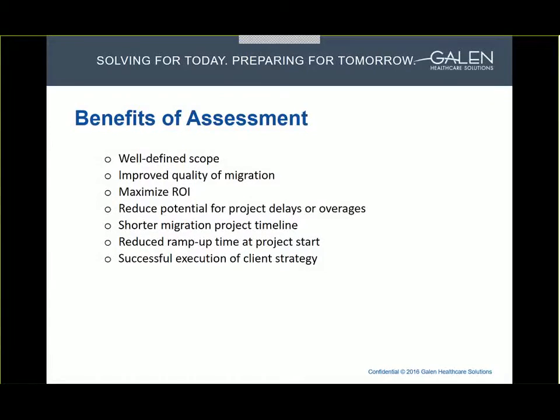Additionally, some of the work from the assessment overlaps with the initial stages of the migration, such as getting access, data extraction, data analysis. Having most of those tasks completed prior to the start of the migration project allows for a high level of productivity as soon as the migration project starts. The assessment sort of lays the groundwork for the migration project.